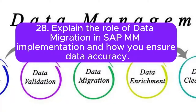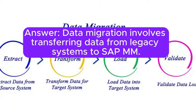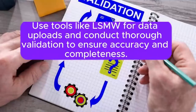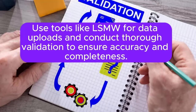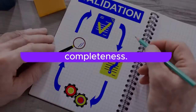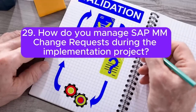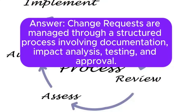Question 28: Explain the role of data migration in SAP MM implementation and how you ensure data accuracy. Answer: Data migration involves transferring data from legacy systems to SAP MM. Use tools like LSMW for data uploads and conduct thorough validation to ensure accuracy and completeness. Question 29: How do you manage SAP MM change requests during the implementation project? Answer: Change requests are managed through a structured process involving documentation, impact analysis, testing, and approval. Changes are implemented following change management procedures.